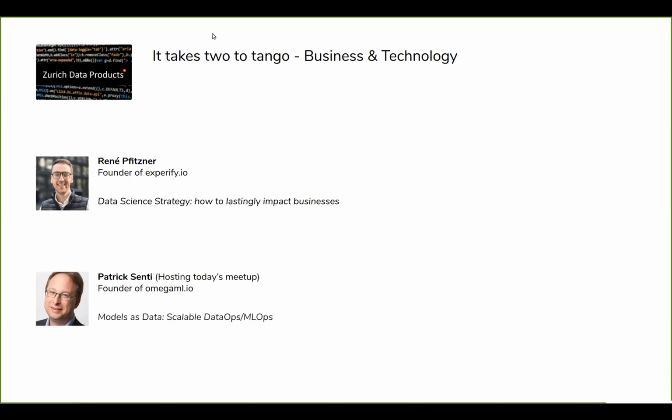So rather than saying, this is going to take us 6 months or 12 months, it's better to say, okay, let's start with a scoped month, and the delivery of this month will be a first analysis on, let's say, the feasibility of the project. Do we actually have the data available to accomplish this task? Does the data have the quality that we need to get sensible results from it, and so on? And this, of course, will not be the full delivery that the client or the business user would like to have, but at least it's moving in the right direction.